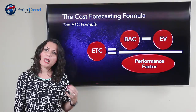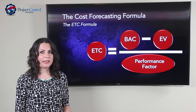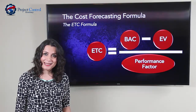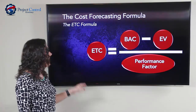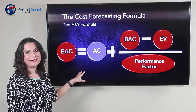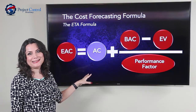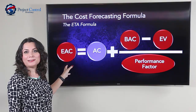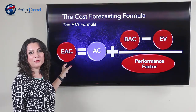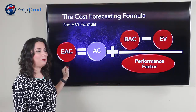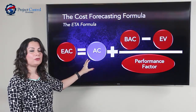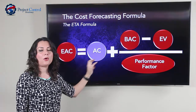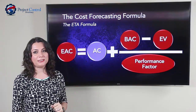So how do we calculate EAC or Estimate at Completion? It's just a matter of adding Actual Cost to the ETC formula. The universal formula becomes: Estimate at Completion equals Actual Cost plus (Budget at Completion minus Earned Value) divided by the Performance Factor.